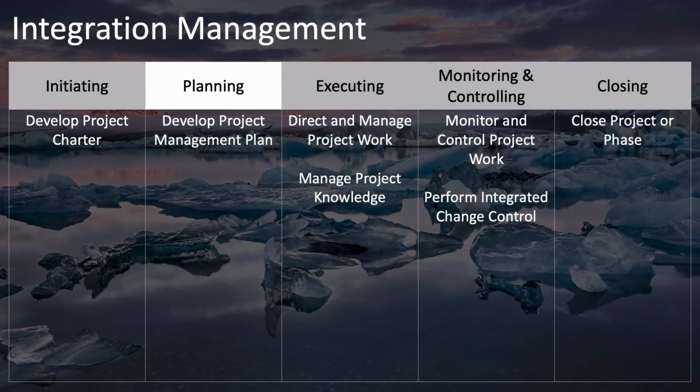Planning change management and planning configuration management both, of course, belong to the planning process group. They're also both part of the integration management knowledge area. These management plans are put together as part of the project management plan as a whole, and this planning is done during the Develop Project Management Plan process.